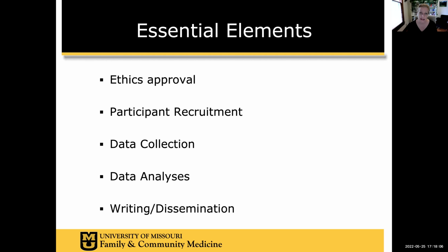Then data analysis. Please don't underestimate this step. If you are not a biostatistician and you do not have a biostatistician on your team, you need to add extra time in to do this, because it's going to take you a lot of time, even though you have the details in your methods. It still takes time to do the data analysis and then figure out what that means.